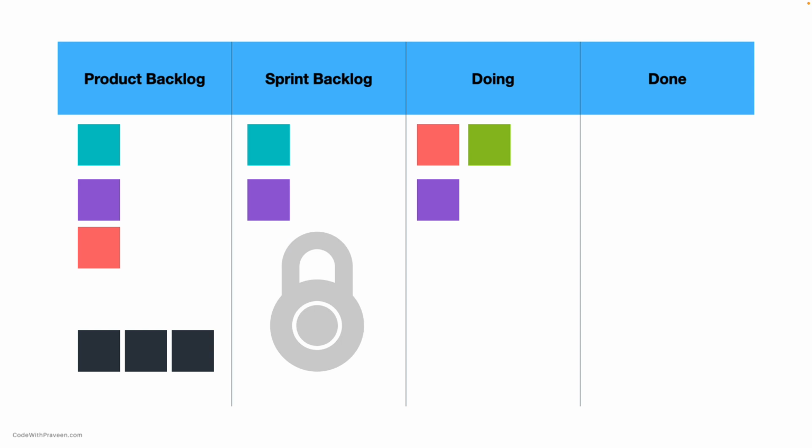Next, over the course of the sprint, the developers implement each of the backlog items present in the sprint. Depending upon the team, the backlog items are either assigned to the individual team members, or the team members can pick the items that are more relevant to them. To track visually, the item is moved from the sprint backlog to the doing category. The idea is that the developer is going to move the item from the sprint backlog to the doing stage, followed by the done stage.